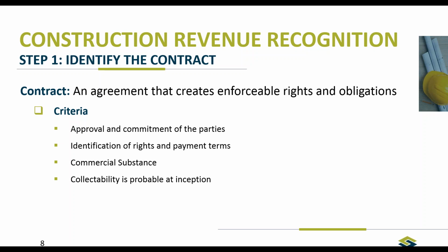The one example I would like to use is an HVAC company. You first install the requirements to get the mechanical work in, and then after you install that, you're selling a service contract. My understanding is those are two distinct performance obligations. Obviously, you have to go through the details, but those should be separate and distinct and recognized as two separate contracts. But we'll mention that later on as well. That's another example of how some of the performance obligations will be split up.